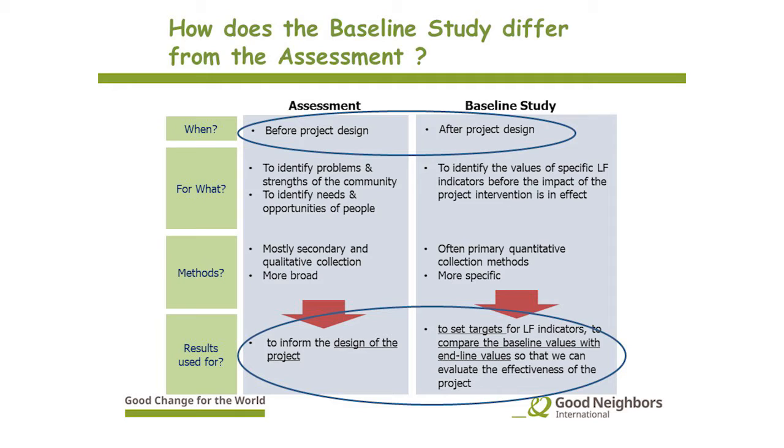The results of the assessment are used to inform our project design. And instead, the results of the baseline study are used to set targets for the actual indicators and to compare the baseline values with endline values so that we can evaluate the effectiveness of the project. So two different things at two different points in the cycle.